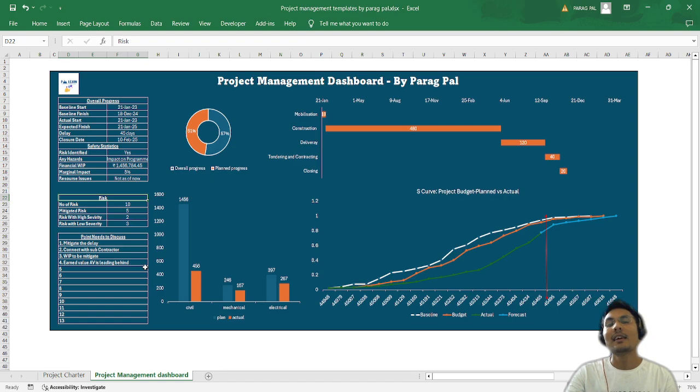So you can see, guys, in this PM Learn channel I want to provide you some good information which helps you bring your project information in front of the higher project management. Here I'm representing the planned progress. My planned progress was 61 percent, but overall progress as of now is 67 percent. It might seem like I am defining a delay, but here I'm representing that I am ahead of the schedule.